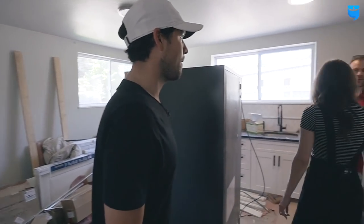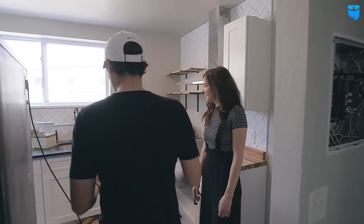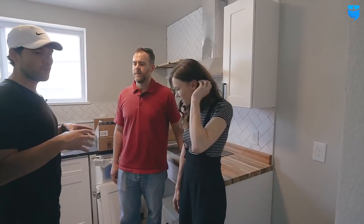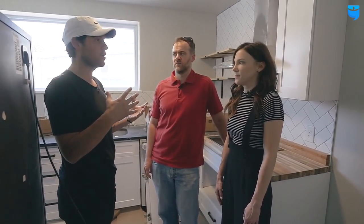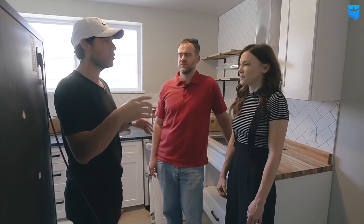Yeah, you got some more work to do in this unit. Yeah, as you can see, this is still an active site. So one of the things we did, even though the other units are maybe a month behind, we did one 100% finished and we'll stage it to put online and have brochures, and we can still have showings. So we'll bring in prospective tenants on the weekends and bring them up to that one unit. They can still see the exterior, they can see the parking lot. It helps us lease before the whole building's finished. Like I said, the holding costs are really high, so having one unit finished before everyone else helps offset some of those holding costs.